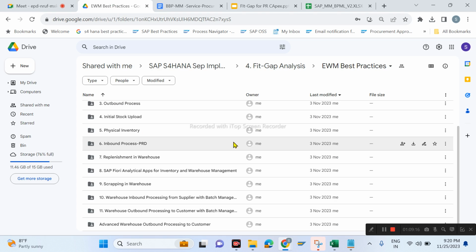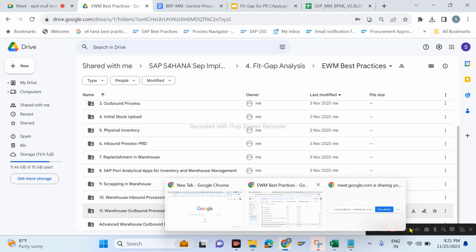Sir, is this implementation a greenfield implementation or a brownfield one? No, this is greenfield only. From day one, it is a fresh implementation. Greenfield is nothing but there is no SAP before. If there is already SAP and you are implementing for another division, we call it a rollout project. So this is for greenfield. From day one, we are going to work on the scope document and BPM. Those are all the deliverables. Otherwise, you can directly do the support-related activities now. So as an end-to-end implementation project, everything the consultant does from day one, you are going to deliver here. Okay, thank you. Yeah.